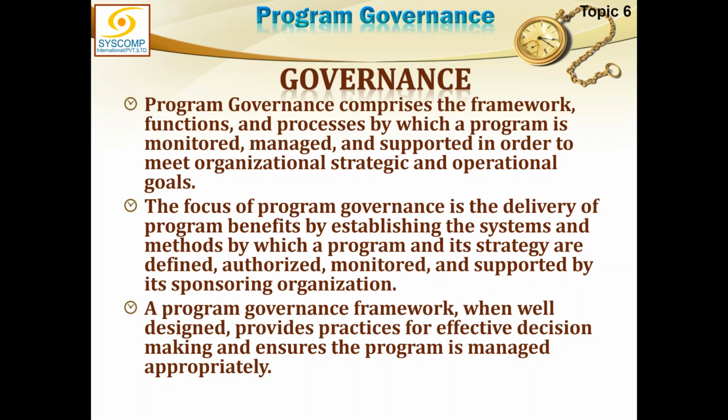Supervisor, if he has that kind of power, would resolve it. If he has the authority to replace that part, he will do it. And if he doesn't or he cannot, then probably this is going to be further escalated. So this mechanism of issue escalation is also basically defined through the program governance, or for that matter, organizational governance. Because issue management is not just a program issue.